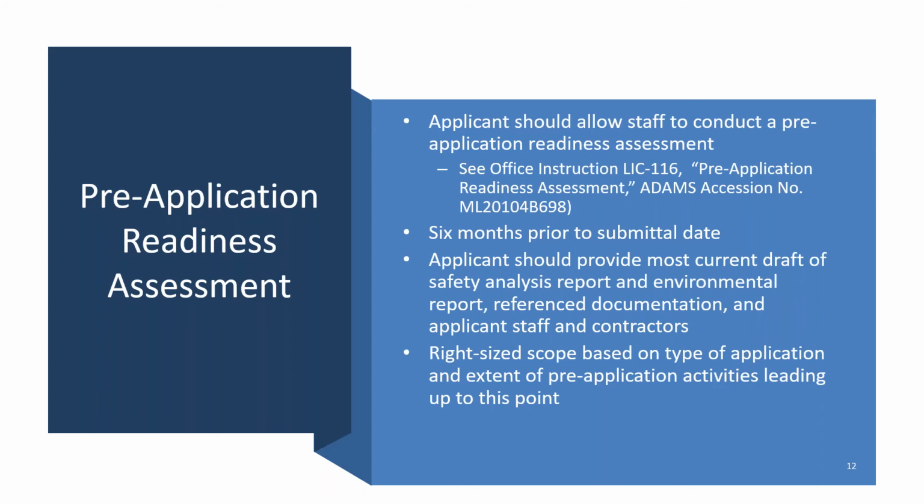We are indicating that a pre-application readiness assessment should be conducted 6 months prior to the application submittal date.